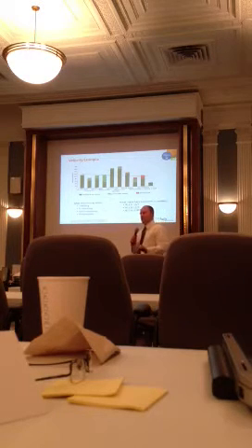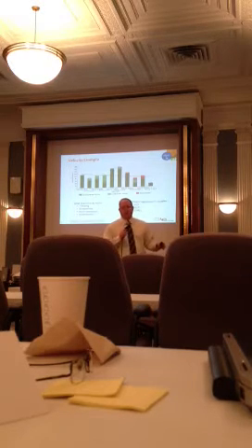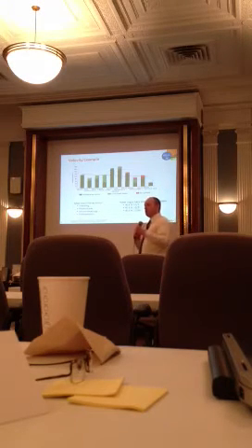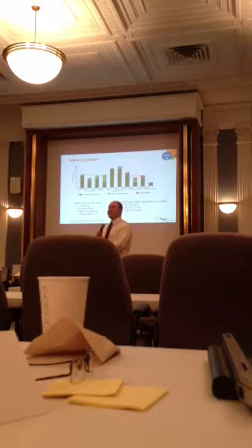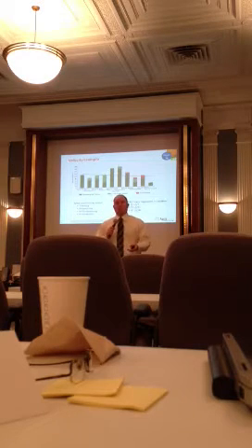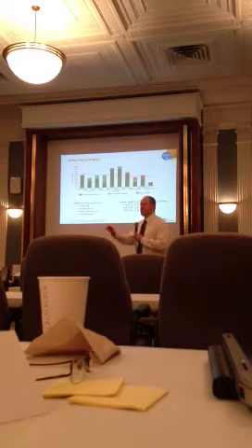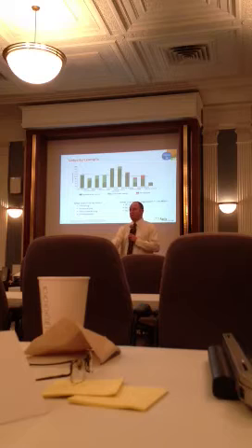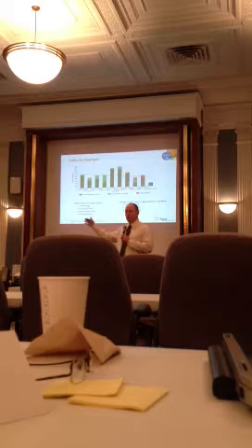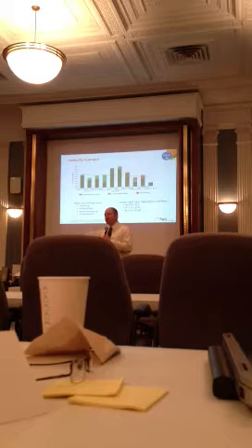Now that is a more complicated concept, right? Because I've already mentioned a bunch of things, like your scrum team shouldn't change. You're trying to keep your scrum team consistent. You don't want to have product bridging over and overlap into other teams, right? All of those things are very good principles, and we do try to maintain that in our space, but we have to balance that with the necessity of the fact that we need to ramp up on new skills all the time. And we need to figure out how we're going to do that. So the Skill Factory Scrum Team folks don't actually report to my Scrum team, but they are still responsible for learning a skill which I can tap into if I have an increased workload. So I can use them essentially to handle some of the overflow work if my team's capacity gets higher than we can handle.